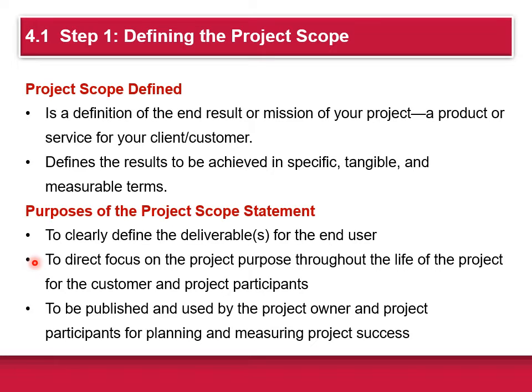The project manager is typically responsible for seeing that there is an agreement with the owners on project objectives, the deliverables at each stage of the project, the technical requirements of the project, and so forth. For example, a deliverable in the early stage might be specifications. For the second stage, 3 prototypes for production. For the third, a sufficient quantity to introduce to market. And finally, market promotion and training.